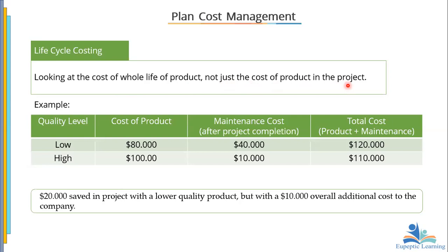Somebody dashes you a car. So you go to the market and you buy this second-hand car from a friend. He gave you the car at maybe 20,000 Ghana cedis. In fact, if you had purchased that car new, it would have cost you maybe 50,000 Ghana cedis. We are just making an assumption here. Now, the life cycle cost is going to be the cost of that old used car plus the maintenance. Maybe every 2 weeks you have to go and service the car because you have to check the plugs and all those things. If you take 3 years, the amount of money you spent on this old car will even be more than the new one, if you had bought the new one within the same 3 years. So that is the life cycle costing.